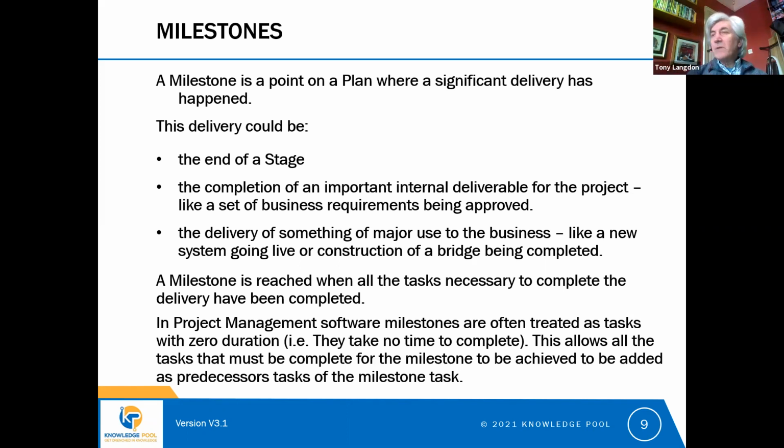And when we're using project management software, milestones are often treated as tasks. They look like a task, but they're often set to have a 0 duration, which means that the task takes no time to complete. So a task, for example, like building a bridge, the duration of that is going to be a year.